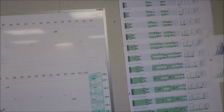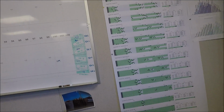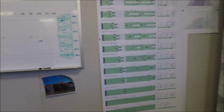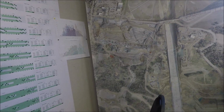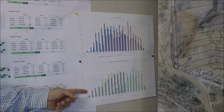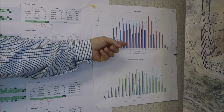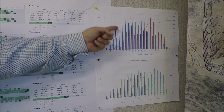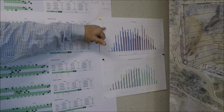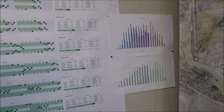Yeah, and this is the plan. So this is a graphical representation of the same thing. There it is, all the squares filled by November. And then these are commodity curves, a way to track the same information on a weekly basis with how many cubic yards of concrete. Red is last season, blue is the 2018 season, and then these are the cumulative lines and how many we're doing each week. So we pushed 7,000 yards one week, our biggest week this season.